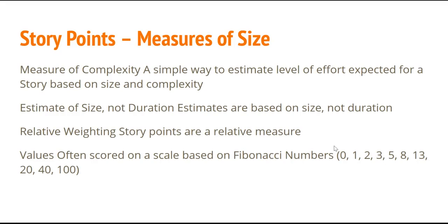Another term that we have is story points. Story points is a simple way to estimate the level of effort expected for a story based on the size and complexity of the story. Story points totally depend on the complexity of the story. It does not depend on the duration.